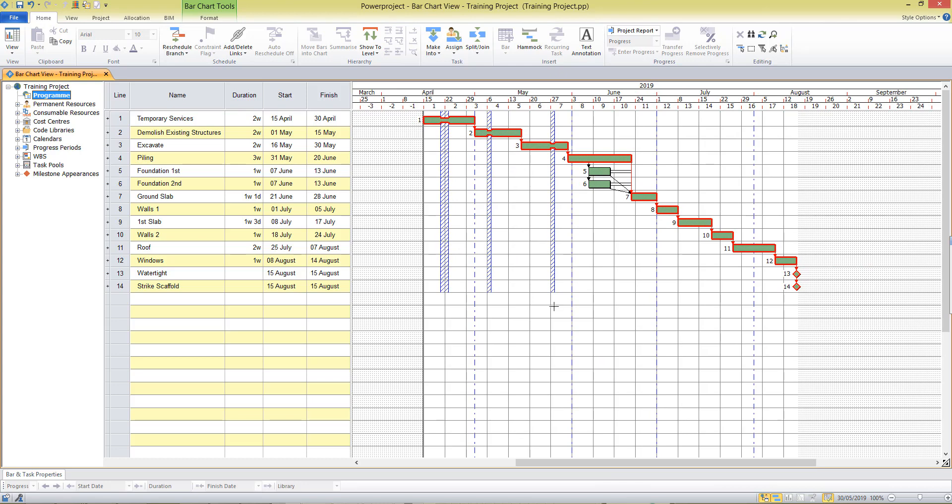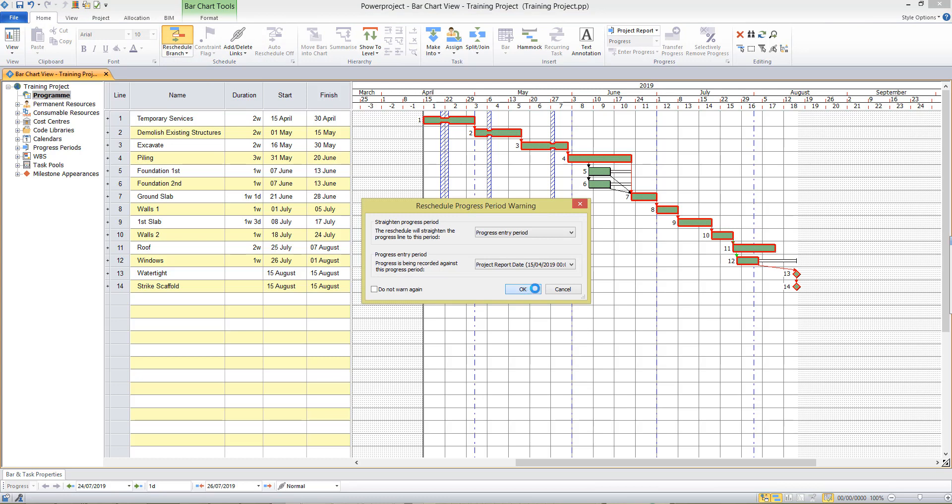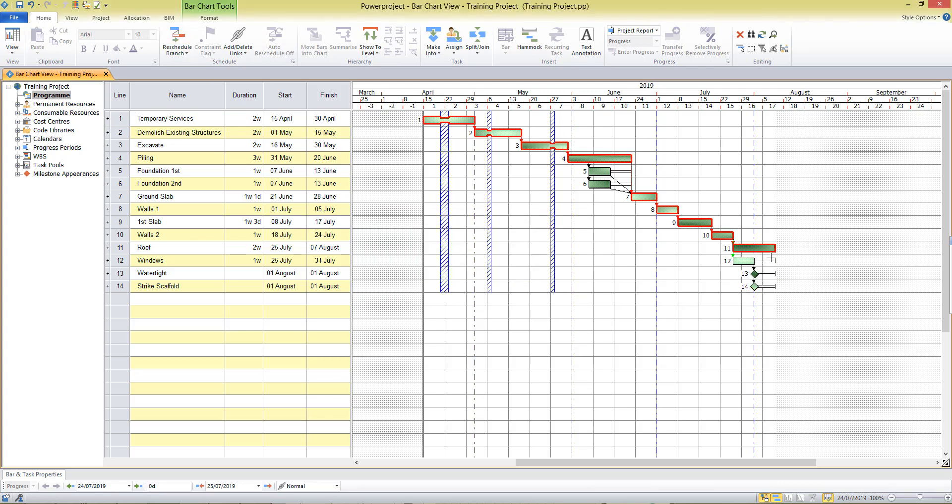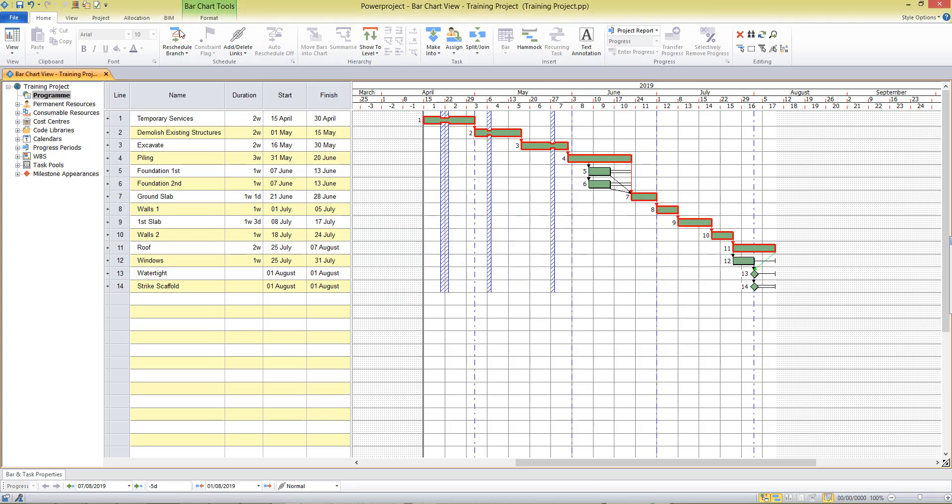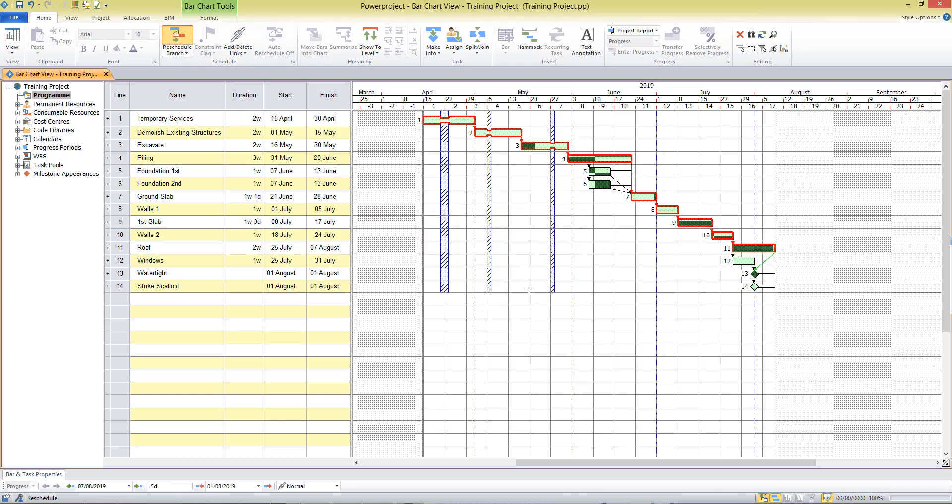What I also want to do then is I'll maybe move the date of my windows activity back so I'll remove this link, I'll delete this link from roof and instead I'll put a link in there from my walls activity. But I need to tie in my watertight date to the completion of roof there. So I can now see the critical path running through my project with a few activities showing float and my end dates have been calculated here.